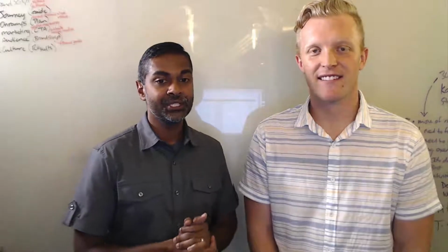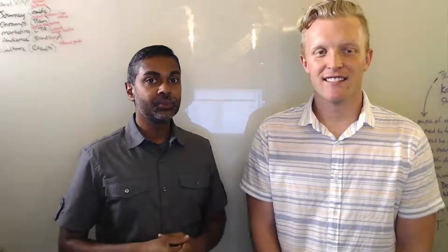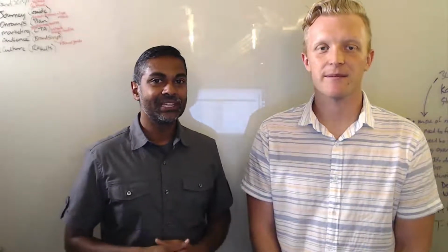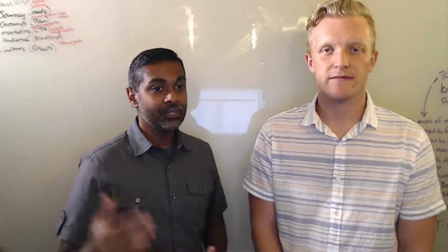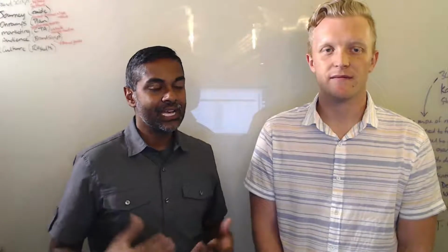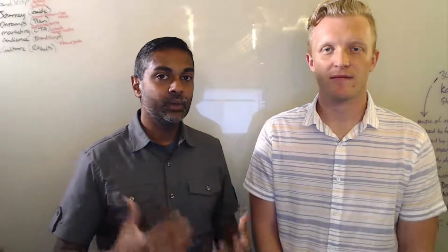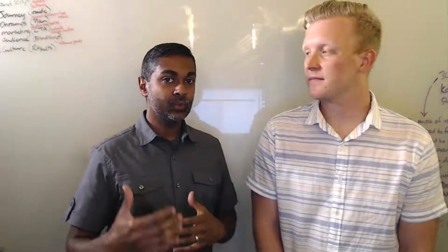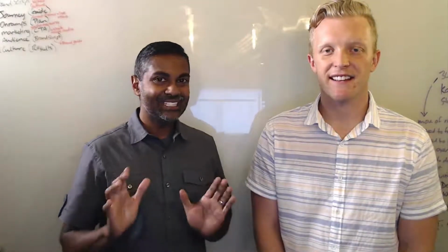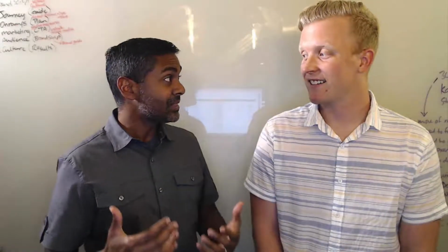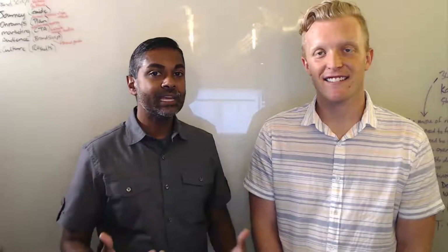along with any other event that you have at your church. So we're going to walk you through this grid, and this grid is going to help you hopefully plan ahead so you can maximize your event. So at the very beginning, there's a time where we're asking some very key questions, and we're talking about 8 to 10 weeks out. So don't freak out on me there. I said 8 to 10 weeks out before the event, we want to start thinking about that event. So we want to ask questions like, what is the win for this event?